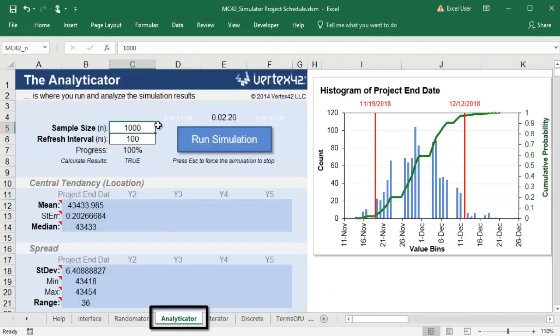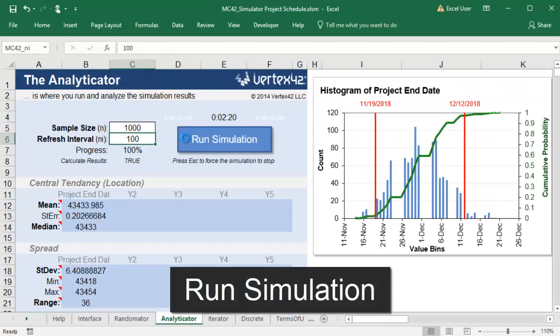In the Monte Carlo Analyticator sheet, I'll choose how many times I want to calculate the end date and then I'll click Run simulation.